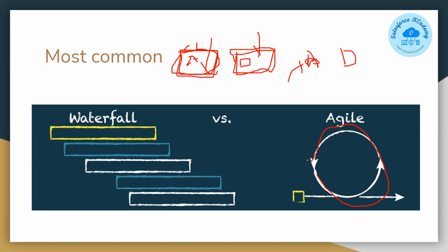Again, for that, there needs to be involvement of your project manager and your architect, and they will have a discussion to increase the timeline, or increase the cost, or increase the resources. When these are involved in the client meetings, that is possible, because you are the developer, but the architect and project manager and, from both sides, the revenue people have all accepted, then you can go ahead with the change.